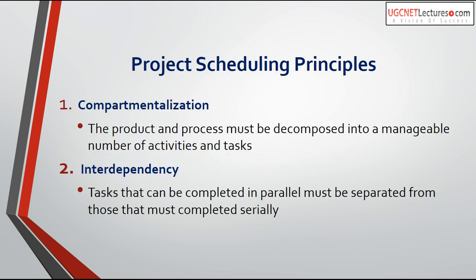Now let's come to the actual project scheduling process. The first phase is compartmentalization. In compartmentalization, the product and process must be decomposed into a manageable number of activities and tasks. What we do first is divide the product and process into tasks. For example, if using the waterfall model, you divide the process into parts: problem statement, requirement analysis, feasibility study, designing, coding, and so on. These are the activities.